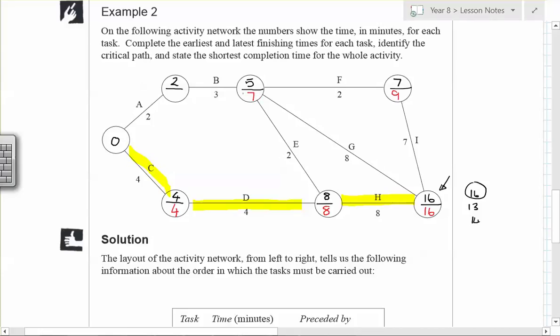No, well, no, this doesn't say this. When can this have been started and everything else still happen? So this is critical. 8. So to get this done, if I don't start that, if that isn't done till 7 minutes, that affects this. That would make 9, and we're not allowed that. So actually, this one can't be 7. It must be 6. It has to be, even though these two suggest something else.